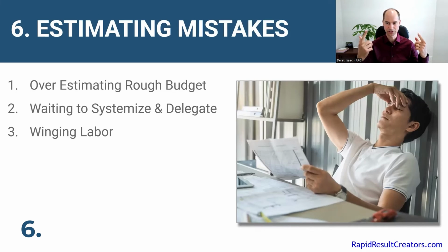I like to do a mental picture in my head of, okay, guys got to show up at site. They've got to unpack all their stuff. They've got to figure out the plans. They've got to start getting into stuff. They've got to put up their site protection, whatever it may be, right? So you're going to lose a few hours there. Then they've got to pull out the cabinets, take the packaging off, set it up, check the walls, level, whatever, right? So just walk through and figure out how long this is going to take.